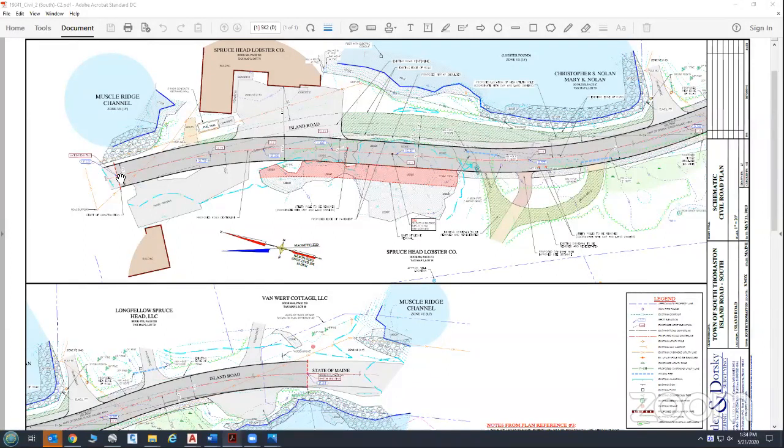And depending on the length of the section, they would build the section 100, 200 feet long. They would stay in one lane, build that road section up, and then transition to the other side and build that road section up. It depends really on the contractor. I've also seen them basically take a road. So if this is the existing road, they would leave one lane in here. They'd have flaggers maintaining it, and they would come down the road and build this entire section all the way down through the new project, putting the new material down, making the road elevation, and then they switch traffic back to this section before they started working on the other lane.